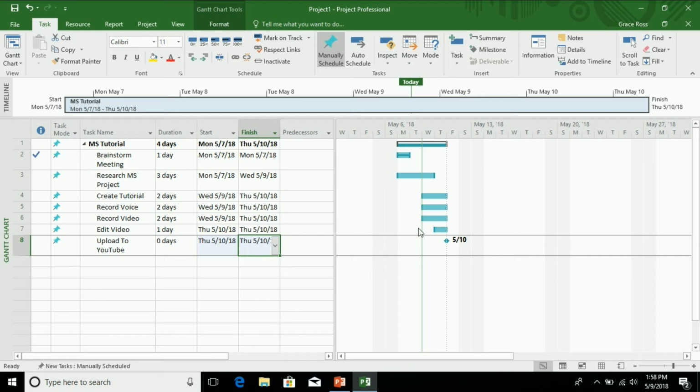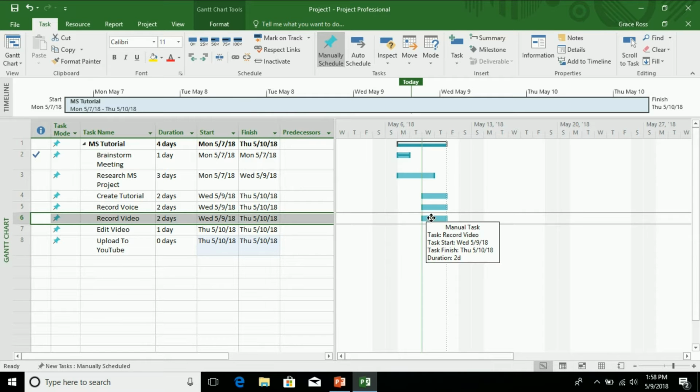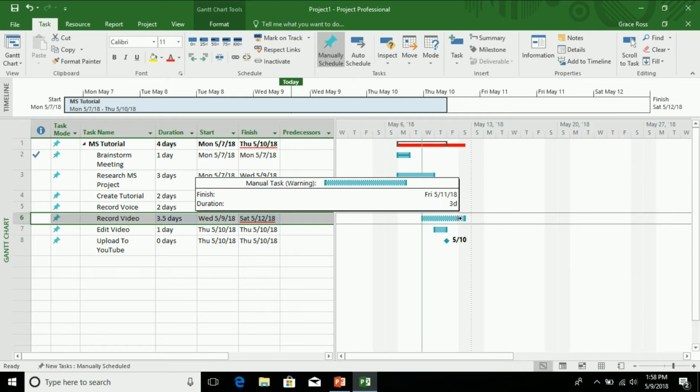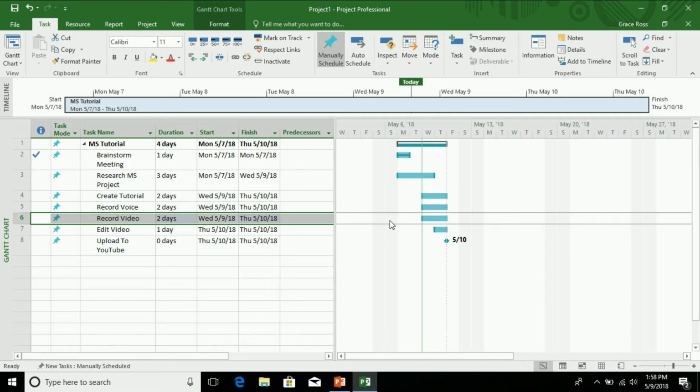If you want to change the dates on your tasks, you can do this by clicking and dragging the box to either change dates or extend the task length. You will note that the bar for the summary is red because of scheduling restriction. We will fix this by dragging the box and putting it back in the range of the summary.